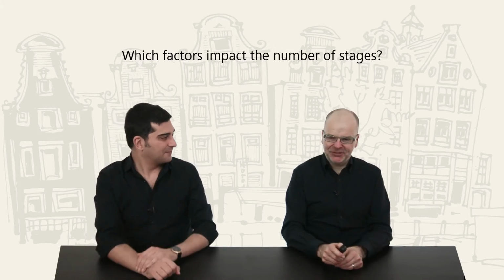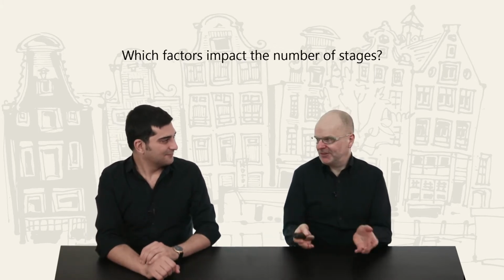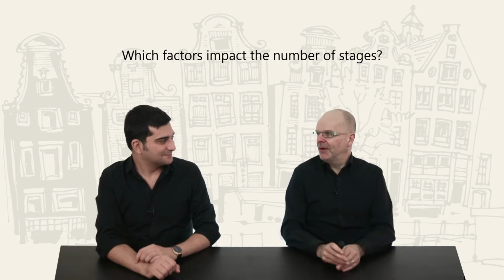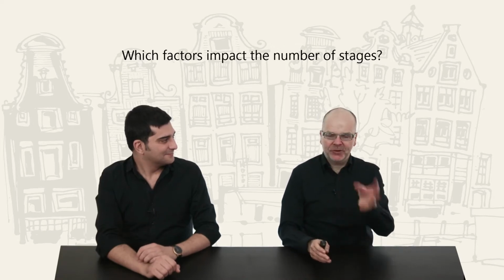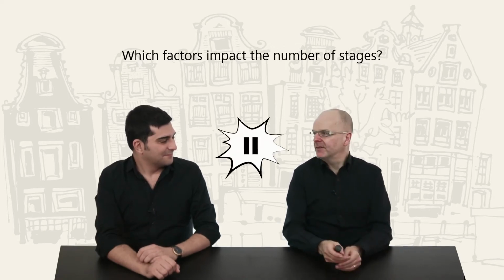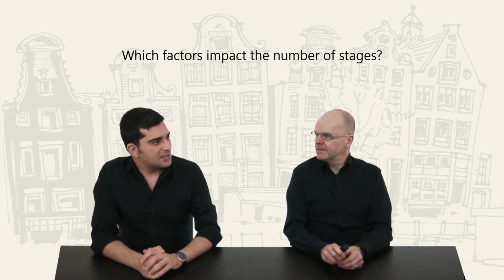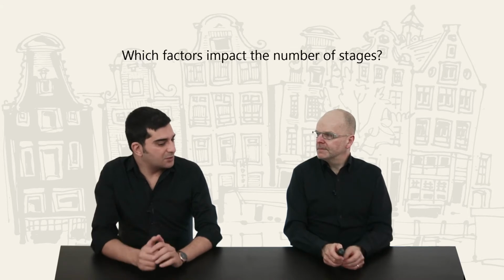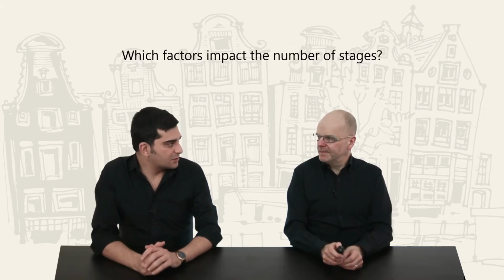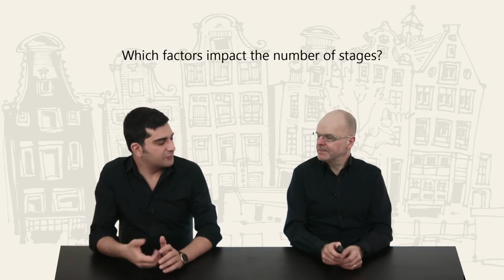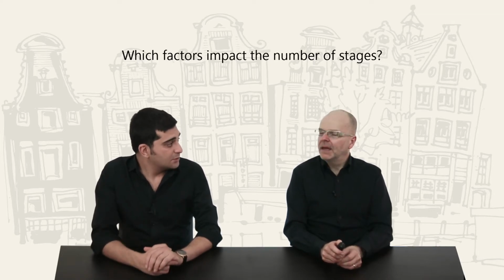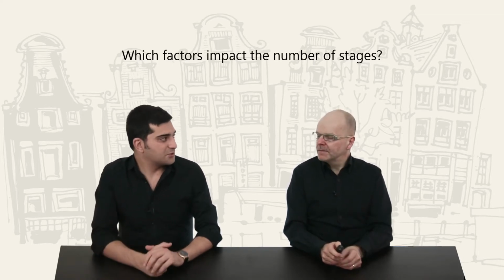So let's pretend I asked the question right, you saw the trap. Okay, so let's say I asked between the project board and the project manager. Does that make a difference, the trust between them? Yeah, maybe they can have more stages to have more controls, but maybe easier than that is to have smaller tolerances. That's the other alternative they have. Or more powerful project assurance. Okay. To keep checking the project manager all the time.